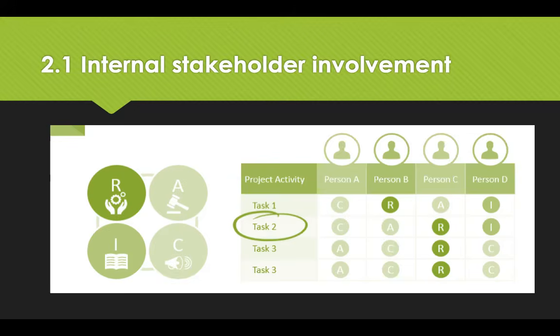So in terms of responsible, the person or stakeholders who do the work, they need to complete the task or objective or make a decision. Several people can be jointly responsible. Accountable is the person who owns the work. He or she must sign off and approve the task, the objective or decision. And they must ensure that responsibilities are assigned in the matrix for all of the related activities. Success requires that there only be one person accountable.